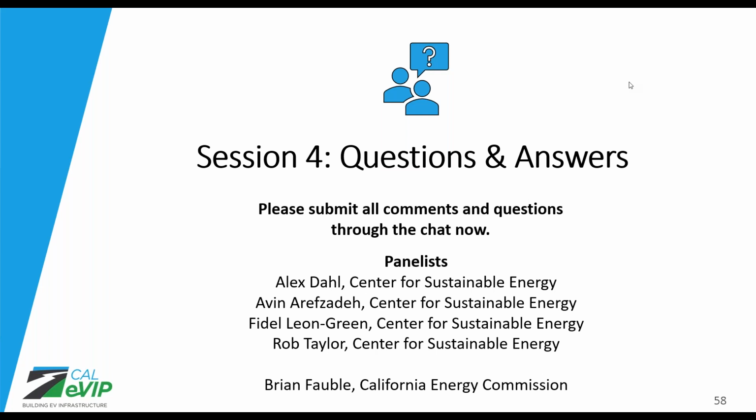A question for Fidel. Will applicants with higher volumes of qualified sites be treated with priority? No, we will not be looking at the specific applicants when creating the queue and assigning or reserving funds. The only characteristics we will be looking at is whether it meets minimum requirements and the tier that the application is assigned. We will not be looking at number of applicants or applications submitted per applicant. And most of those funds will be assigned randomly. So if there is some higher volume of applicants selected, it's purely through the random selection and not through any sort of prioritization.